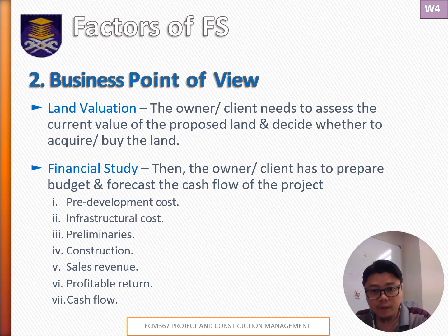And for the preliminary outlays, it covers site survey, soil testing, and preliminary site preparation work such as clearing up the land and also excavation work. Okay, so the rest of the examples, I think you can try to find yourself later, right?